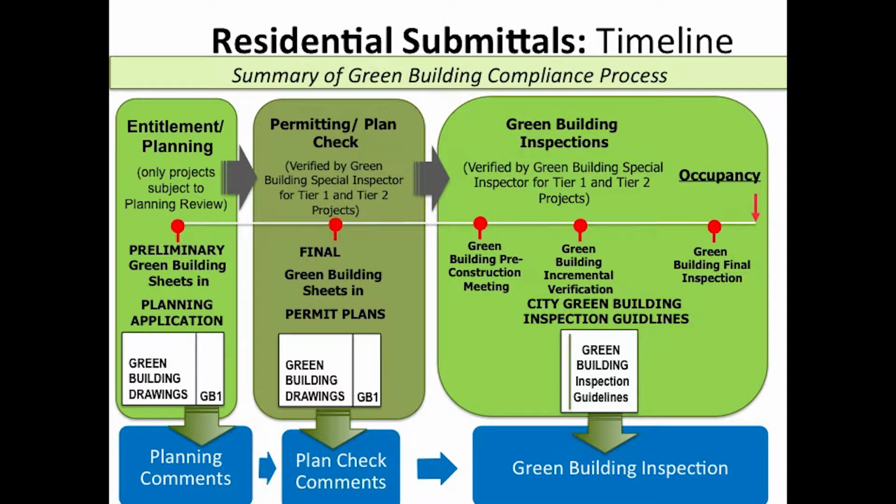During this phase, staff will be looking for the final green building sheets to be included in the permit plans. Similarly, if items are not included in the permit plans, the applicant will receive plan check comments to that effect.